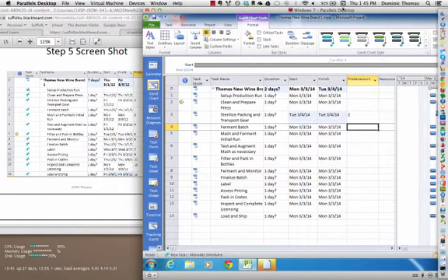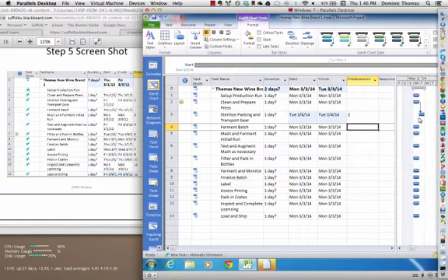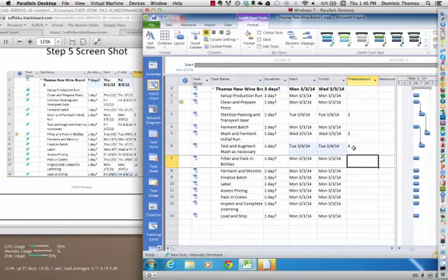Now as soon as I put that in, I don't know if you noticed this, but in the Gantt chart over here, it drew a line and it started task 3 after task 2 because that's the relationship between them. And so I'm going to keep going down and write in these other ones. And as I do that, my Gantt chart is building itself.